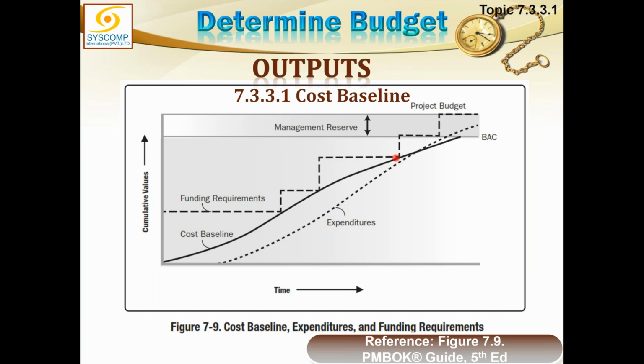At this moment, this much money should have been spent. For that matter, not really spent. This much money's worth of job should have been completed. This is the planned value for this point. So every point on this S curve is a planned value of that point, and the highest point here is the planned value of the last moment.